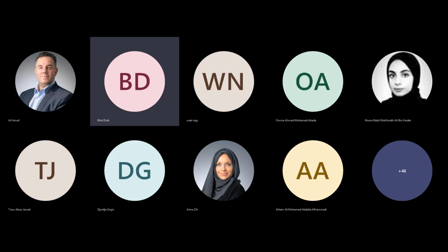Thank you so much, very good question, Dr. Ali. First of all, as an appointing party, we have to know that there are multiple appointing parties, let's say a developer is an owner, RTA is an owner, not a single appointing party. A single appointing party, like a villa owner, for sure will not create a common data environment. He will not be responsible for it. Usually for small projects like villas, the owner's representative is most of the time the consultant. But if we go with bigger owners, like developers and asset owners, they may assign somebody who will be responsible for the information exchange and the common data environment, or hire directly somebody who creates it.